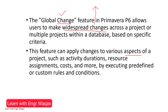Global Change executes predefined or custom rules and conditions. The main project attributes it affects are activity attributes — duration, resource assignment, and activity cost. These are the major data types that Global Change can modify.